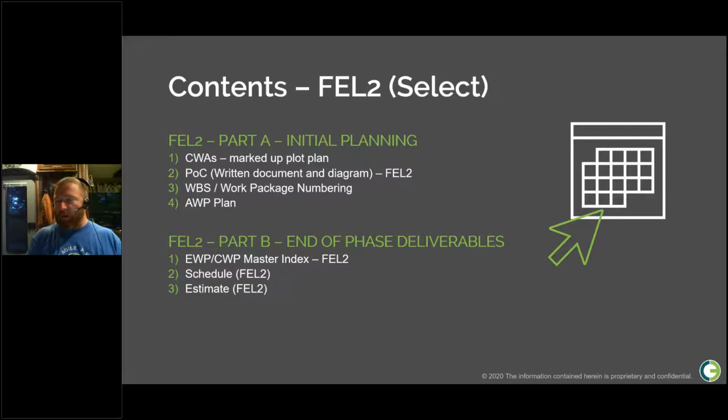It's going to show you how you need to adapt your existing tools and processes, hopefully as little as possible, to fit into AWP. So like I said, if you build your schedules in P6, you're going to keep building your schedules in P6. All that AWP is going to do is ask that you do it in such a way that it can line up to the work packages below it.